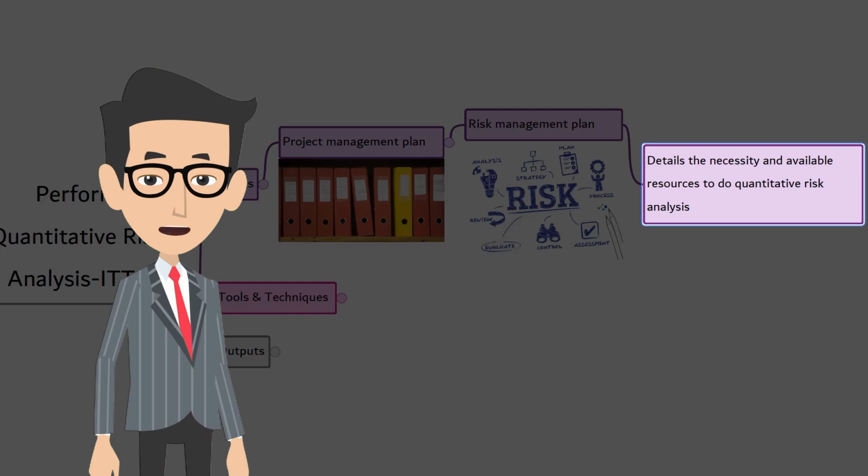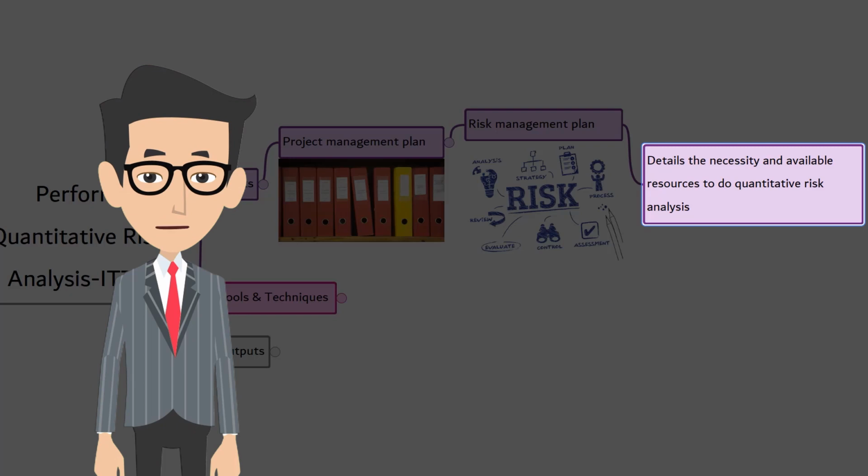The risk management plan specifies whether quantitative risk analysis is required for the project. As discussed earlier, not every project needs quantitative risk analysis. The need of quantitative risk analysis should be mentioned in risk management plan. It also details the resources available for the analysis and the expected frequency of analysis, because to do quantitative analysis, you need specialized risk management expert and specialized software.